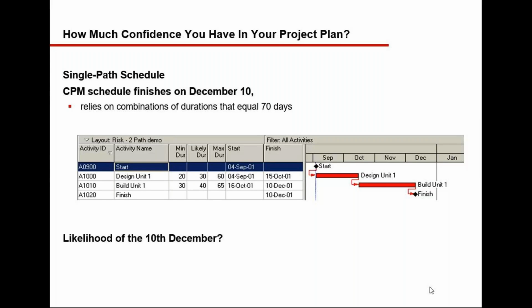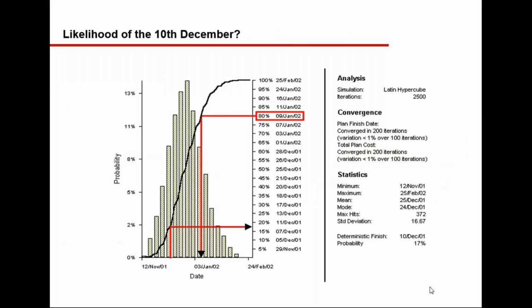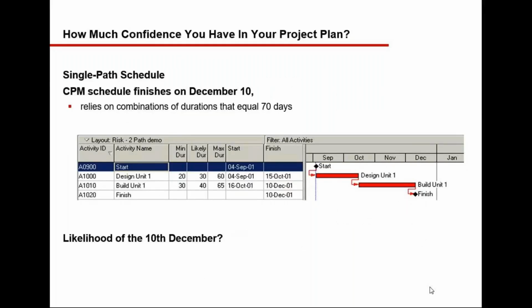Now, when we say qualitative and quantitative, in Primavera P6, either PPM or EPPM, you can do qualitative risk analysis. What we do in qualitative risk analysis is give some values based on the perceived impact the risk has on the project, based on which the scoring, probability and impact, is done.